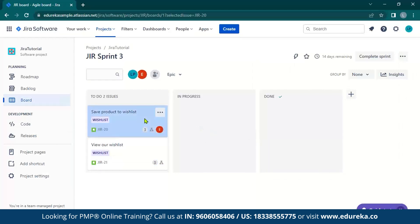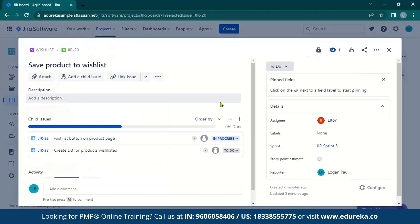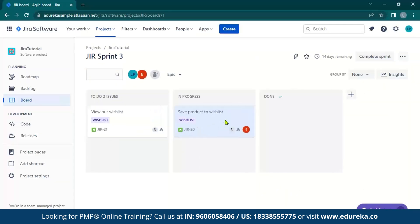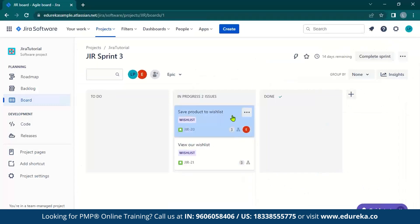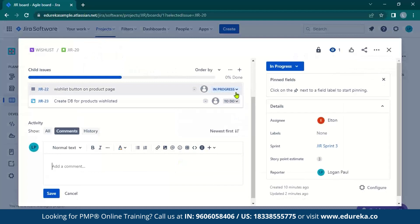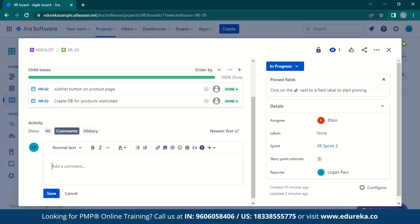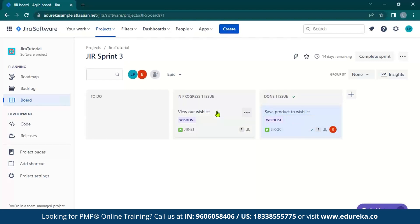We can now go inside the stories and start tracking progress. You can see the to-do buttons near our subtasks, so you can expand them and click on in progress. Since the story is in progress, we can close this and slide our story into the in-progress section. We can also do the same for our second story. Once you are done with a subtask, you can go to the same place and specify it as done. Once progress is 100% done, you can take the story and shift it over to the done column. We can also do this for the second story.